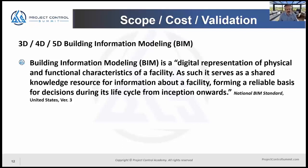At that point we were talking about how we could embed information into the 3D CAD model so I could know which components are installed at heights, and identify whether an item is in a congested area due to its spatial placement in these 3D models — again to try to identify how congested an area might be. All of which would allow me to apply better adjustments to those default labor hours from our labor charts and incorporate them into our estimates.